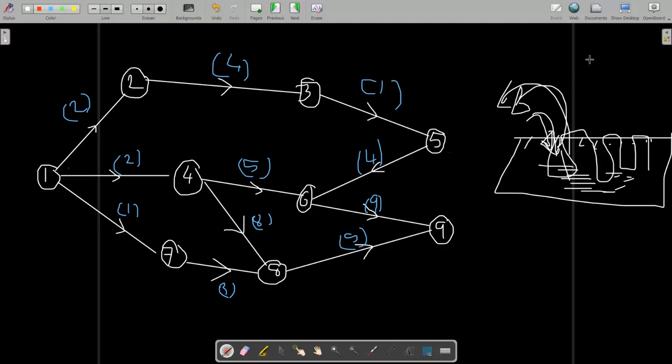So let's start, assume that it is the first day and you start digging. To make a complete house, first you have to complete this activity, then you can make a foundation. We cannot do digging and foundation simultaneously. So first we dig, and assume that after 5 days all the soil is taken out.